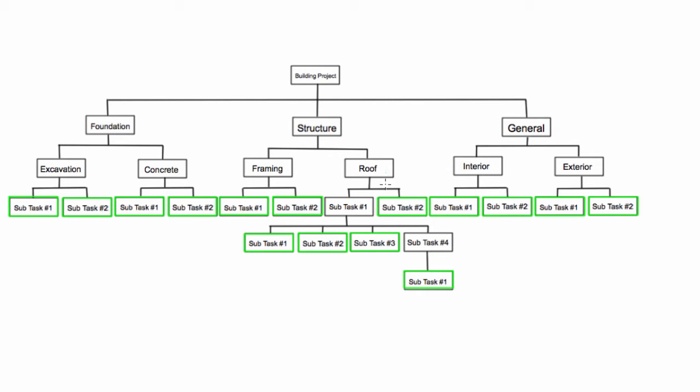The first thing you have to do, say you want to build a project like a house or something, we're going to look at a construction project here. First someone has to come by and identify what are we going to have to do to build this house. First we'll need the foundation, then the structure, and then some other things, and then they can further break those down.